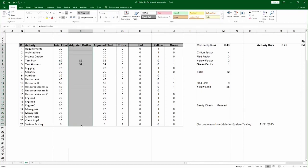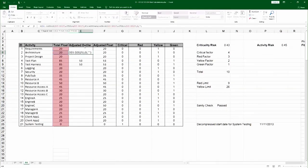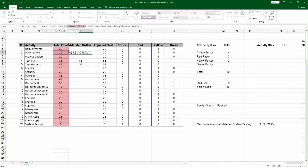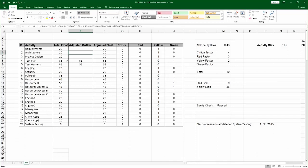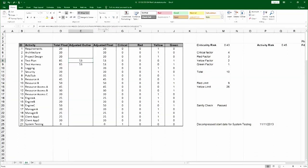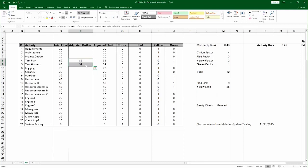Writing software shows how to adjust the outliers. What we have here is an adjusted column. It has the following formula: it examines the value to the left and compares it to the average of all floats plus one standard deviation. If the value here is indeed greater than the average plus one standard deviation, it replaces it with the average plus one standard deviation. And indeed if you look at all these other cells, it didn't touch them except it identified these as being the outliers and adjusted them.